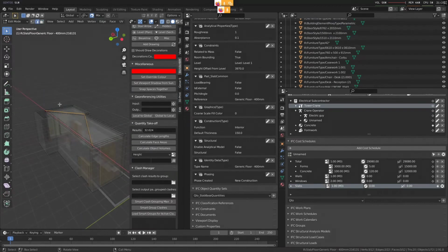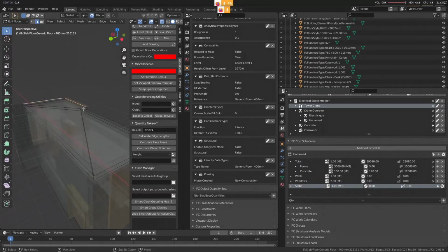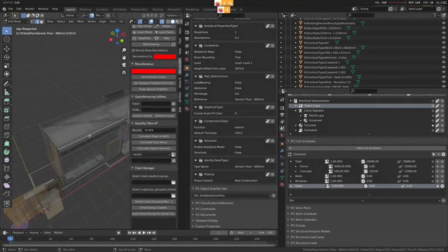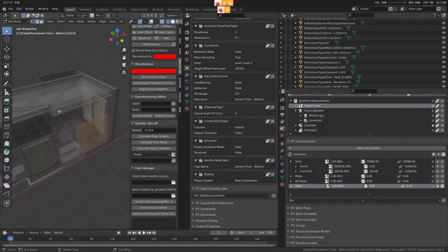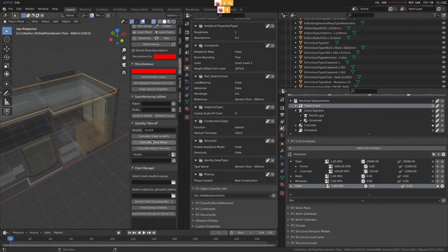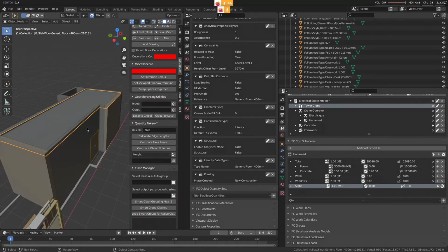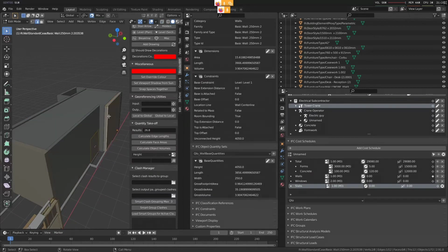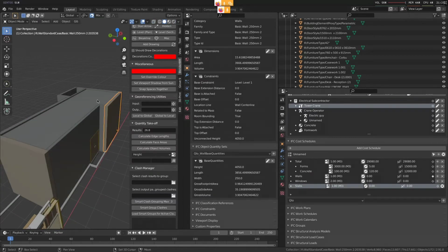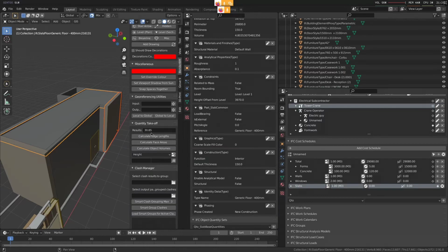Same with edge length. So let's say we just want to get the perimeter formwork, so we can go and select here just some edges, and then we press that. So this allows you to do very detailed quantity adding up of the items that you selected, and you can do this with multiple items. So if I want to add on this edge of this object for whatever bizarre reason, it adds up to 30, for example, or both of these together is 8, for example, cubic meters.